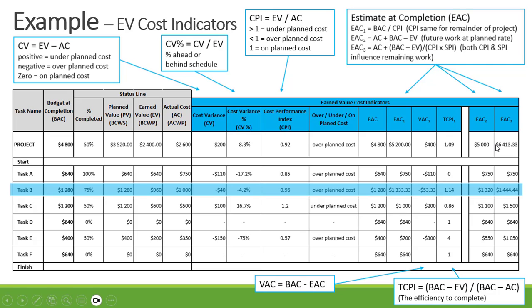You can also calculate your estimate at completion using the second formula where future work is at the planned rate, or using a formula where both CPI and SPI influence the remaining work. From those you can then recalculate your variance at completion and to-complete performance index.